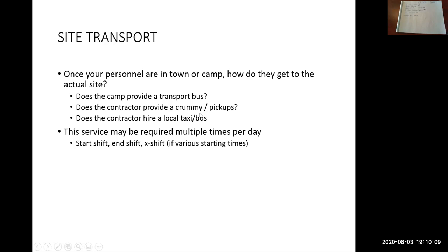You can rent vehicles up in the area. Maybe, if it's a long job, say 6 months long or longer, you ask some of your employees to drive company pickups to wherever this project is. You pay them to drive there. Then they leave the pickups there as the site vehicles, and you fly them home as they need to come home. So that could also be a possibility.